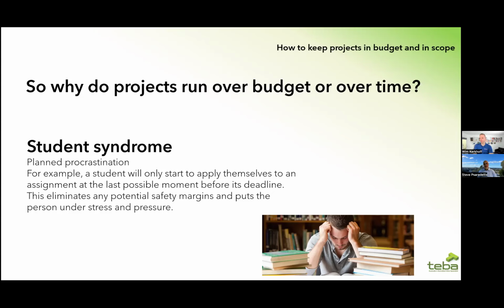So that's one reason projects run over time, because people start as late as they can, or as late as they want to. So what this means is that any safety margins that may have been put in from an elapsed time perspective are all gone because we're starting at the last minute.